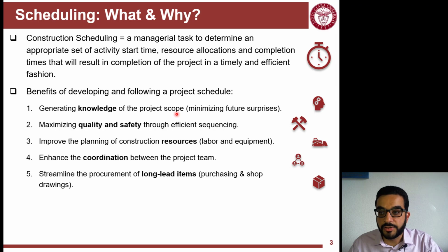Another one is elevators. If you have an elevator, there are shop drawings, also fabrication. It's not like an off-the-shelf item. And another one is in large commercial kitchens, there's the walk-in freezer. This is also something that's fabricated by order, so you have to make sure that shop drawings and everything fit together before you fabricate and ship it to the site.